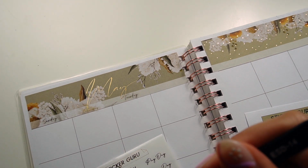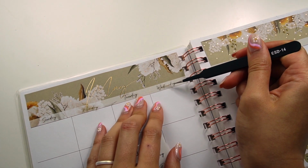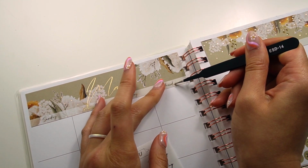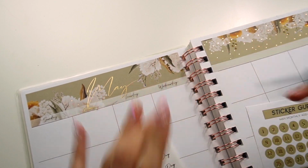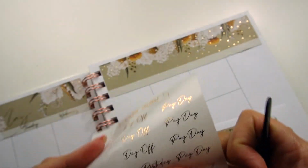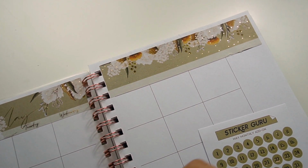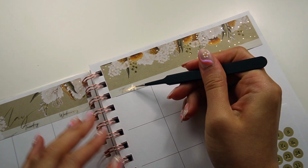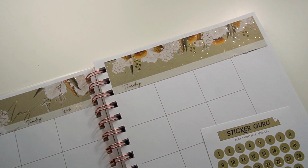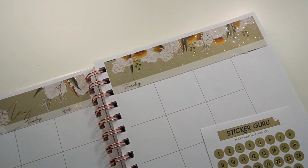Yeah. And I think we mentioned it in a previous episode, but we use the Kanban method using Asana, and we basically just hand off the task or the kit to the other person whenever we're done with it so that we're not just sitting around waiting, doing nothing. We know when it's our turn to start working on the kit. Yeah, it's been really helpful to do that. And that's a recent development as well. We didn't use that before.